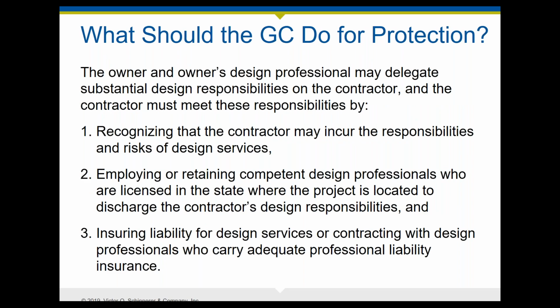That leaves the contractor and what the contractor should do for protection. Well, contractors, I think, who accept this risk recognize that they will incur some responsibilities and risks for the design services. And they look very closely at what the contractual responsibilities and relationships are, what the real lines of responsibility are. They review documents very carefully for any delegated design elements that might not be clearly spelled out. They realize what their level of coordination is, if it's a subcontractor's responsibility for this design delegation. And they look not only at their own insurance coverage, but they look at the insurance coverage for their specialty contractors. And that's a big part of how they protect themselves.